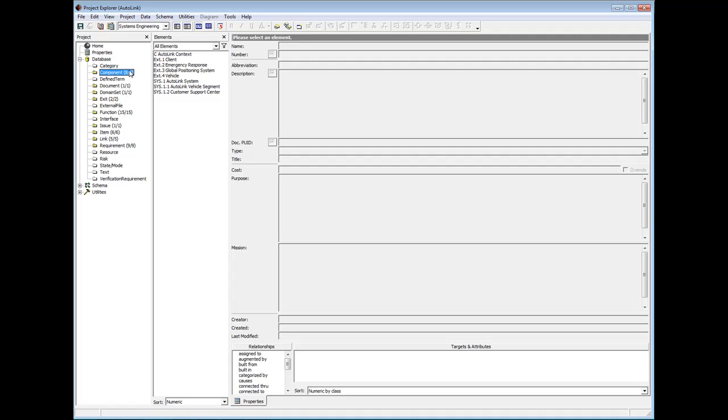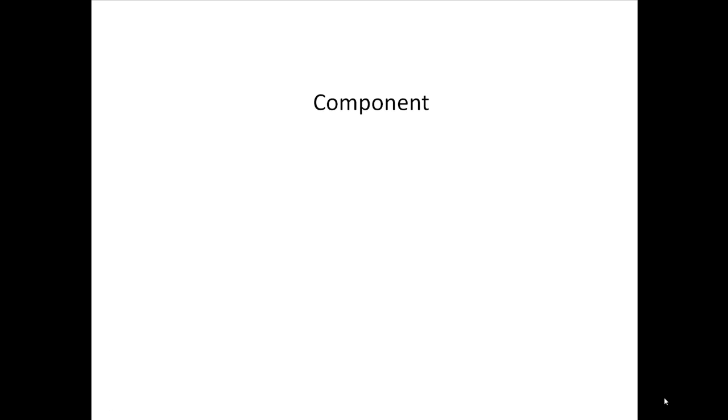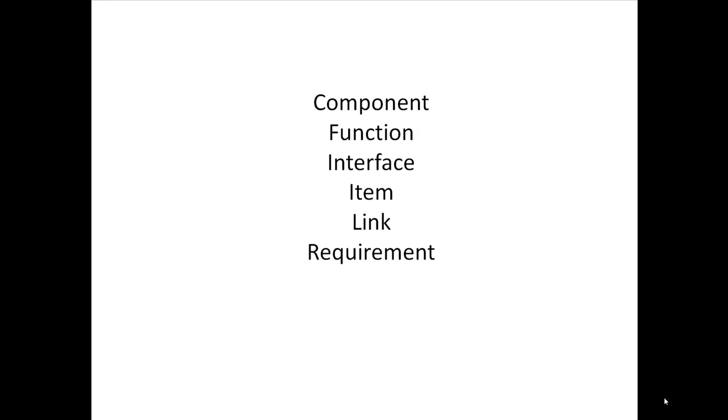Versioning is not enabled on all classes and attributes by default. The classes that are enabled by default are Component, Function, Interface, Item, Link, Requirement, and Verification Requirement. If you are interested in learning how to enable versioning on other classes or attributes, be sure to view our advanced versioning tutorial.